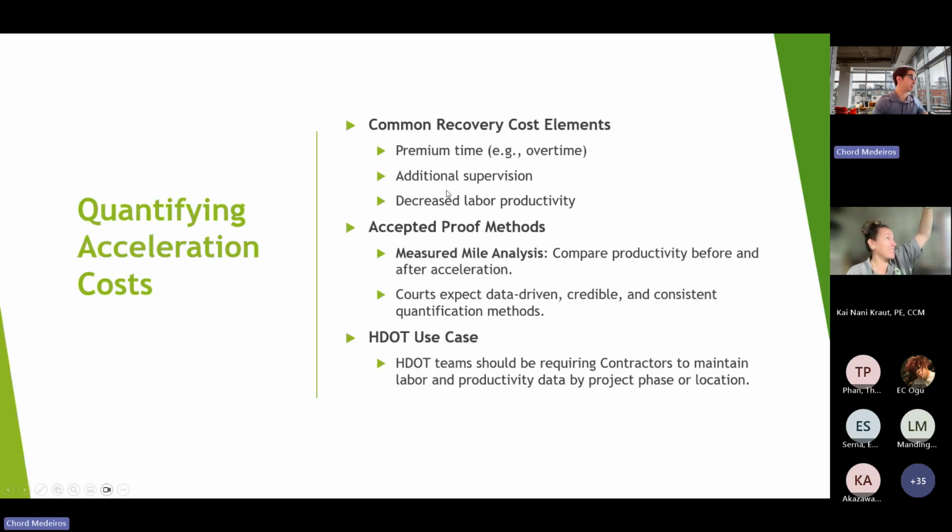Common recovery cost elements include premium time. Often we'll see on projects the contractor charging overtime, or showing that additional supervision is needed, in particular for accelerated impacts, and decreased labor productivity. We want to make sure that we're analyzing all these things, and that labor productivity is consistent.